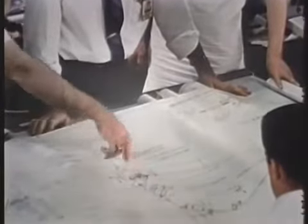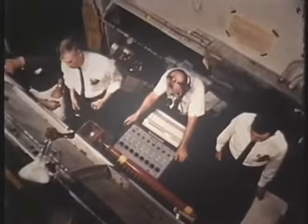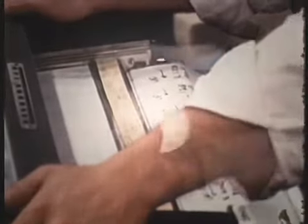You see, we started out with a high lift system. Then, rather late in the game, but as a result of continuing wind tunnel testing, Lockheed engineers found they were becoming critical on the three-engine climb-out. They wanted to trade off some lift capability for some freedom from drag to improve that climb rate. So they shifted to a Fowler flap system, which also changed the slat design. To accommodate a design change this important, this late, and still meet schedule puts the heat on. And it takes good cooperation all round, as well as good management by primes and subs.